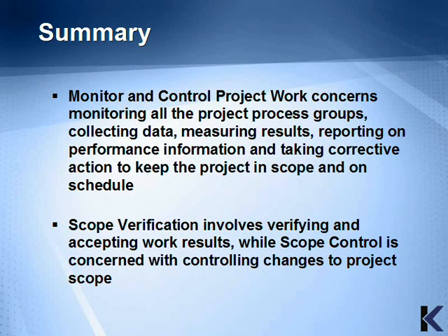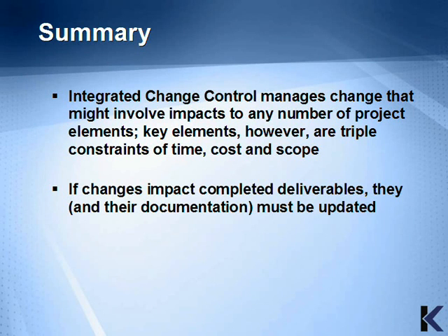Scope verification involves verifying and accepting work results, while scope control is concerned with controlling changes to project scope. Integrated change control manages change that might involve impacts to any number of project elements. Key elements, however, are the triple constraints of time, cost, and scope. If changes impact completed deliverables, they and their documentation must be updated.